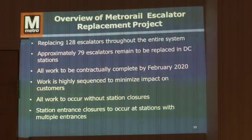So thunderstorms or that sort of thing will not impact? It will. That's what I'm saying. The wind, when we're setting up the cranes, because the crane is going to have to set out its footers and be dangling there with the truss in the air. So if you have high winds, thunderstorms, it could change the direction of that truss rather quickly.